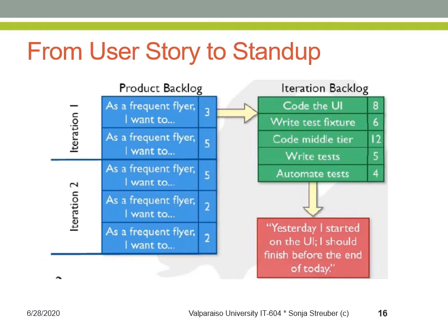Once a team member commits to completing a specific item, they will be reporting on their progress in the daily scrum. The daily scrum is a 15-minute stand-up meeting in which each team member reports on what they have finished the day before, what they're working on the current day, and if any help is needed, what the help is that they need. This reporting is absolutely critical to making Scrum work. It keeps technical people productive and accountable. Because honestly, who likes to freely admit that they're running into problems they can't solve?